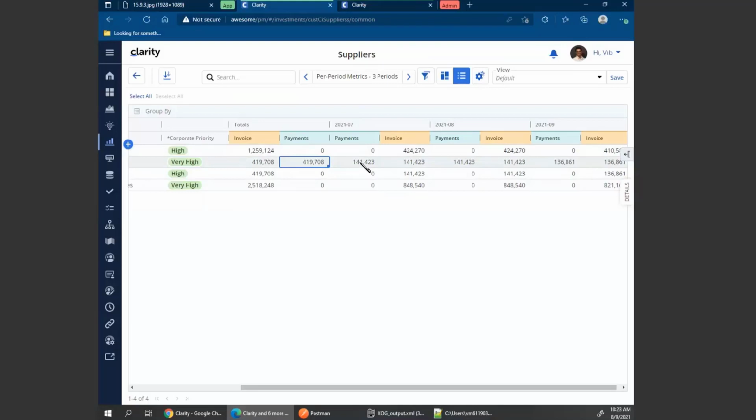There were some adjustments. Let's say in July, I maybe did not make that exact payment. I only made a 140,000 payment. So I can also do that by editing the individual cells. When I do that, I can see my totals for that sum of period get updated. Because I was only working with the 3 months and my setting was sum of period, the spreading is only happening for that sum of period, and the total is only displayed for that sum of period.